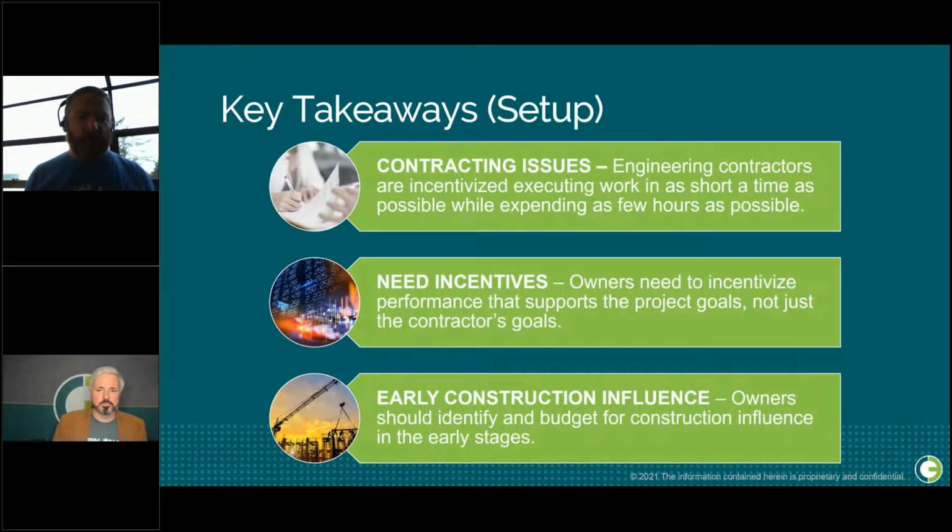We also wanted to talk about setup. So when you're setting up a project, for example, the contracting issues. Engineering contractors are incentivized to execute their work in the shortest time possible and expend as few hours as possible. The problem is we're putting them in a box and saying you're only interested in engineering. So quite honestly, they are naturally going to do just what's required to fulfill the requirements of their scope of work. We need to take that contracting approach and create it as more of a project-wide mindset.